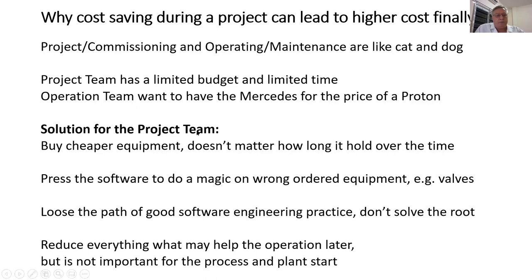What does the project team then do? The project team does it very simply. They just buy the cheapest equipment they can use, and they don't mind how long it holds. It is not true for everyone, so I have to over-describe it a bit, but in principle, I have seen it very often like that. They don't mind if a pump is maybe not really suitable for that, but it still runs and for the moment is okay. But they know in half a year or one year the pump will break, so operating has to exchange the pump. If you would buy a bit better pump directly, you can reduce the cost, because you have to spend some money in the beginning, but later on you will not have a trip and a plant shutdown because your pump is broken.